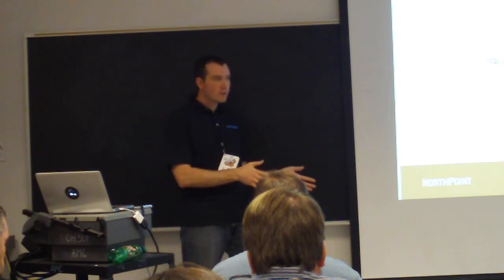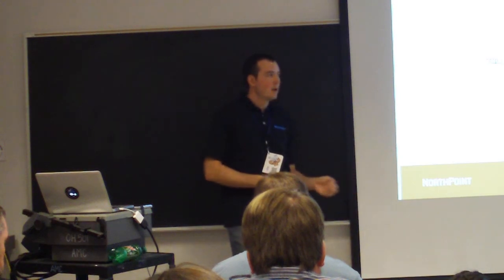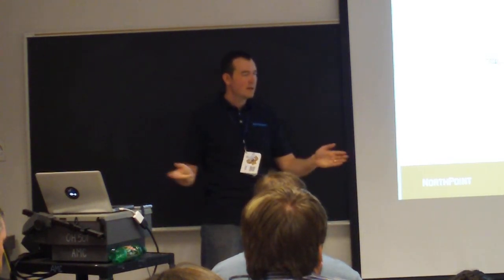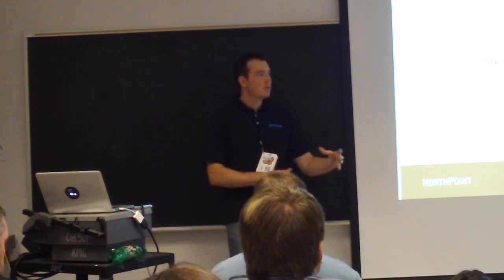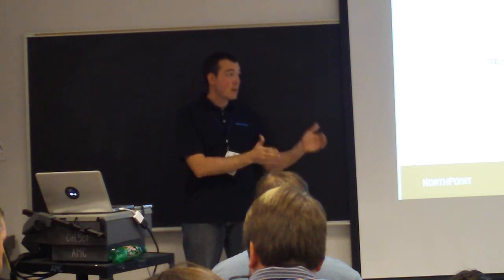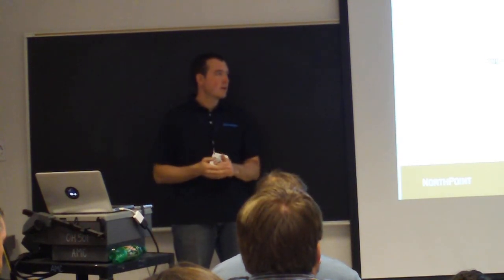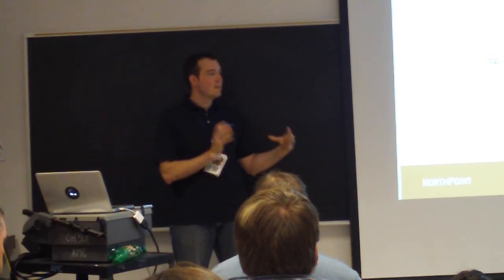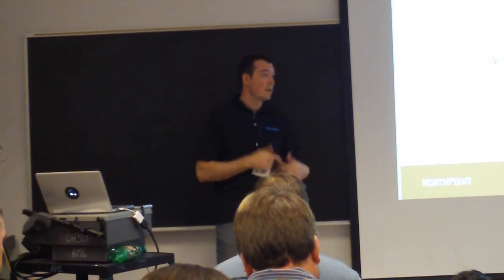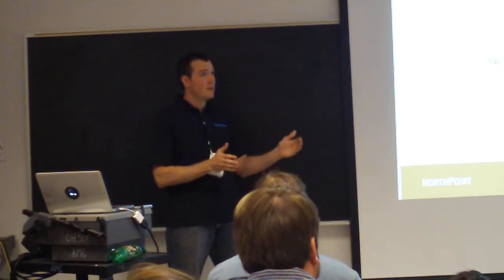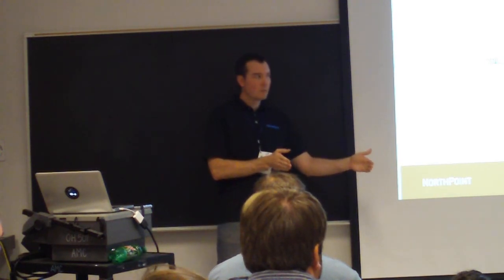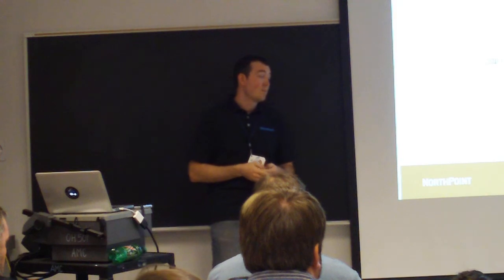And sometimes I do have to shift the way we do things a little bit. If they want a full project plan, they want to hit these dates. Agile is a little bit more loose. The idea is you're going to do things in 4 weeks, but you're not going to get them done, and you're going to push them into the next release. Sometimes, even if it's not done, they want that pushed into the release as well, so that they can actually see it. Or we have to work extra hours because they thought we were going to hit this with all this amount of work.